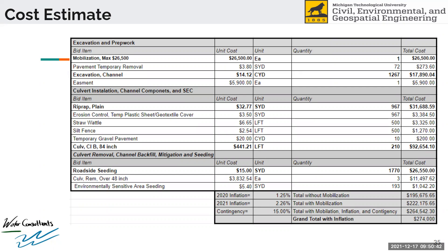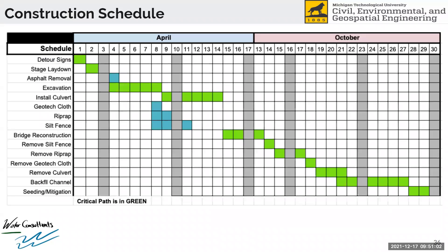As a rough guideline from MDOT, we used a mobilization cost of about 10% of the total project cost. We used 1.25% for inflation for 2020 and 2.26% for 2021, as well as a contingency rate of 15%, coming out to a grand total of about $274,000. Here's our final schedule. The critical path is in green and tasks that need to be ongoing at all times are in blue — that mostly applies to soil erosion prevention. The schedule jumps from April to October because in the middle of the project they have to demolish and replace the bridge. We chose beginning of April to end of October because that's pretty much the construction window for this area, making sure we're not getting too far into the winter months.